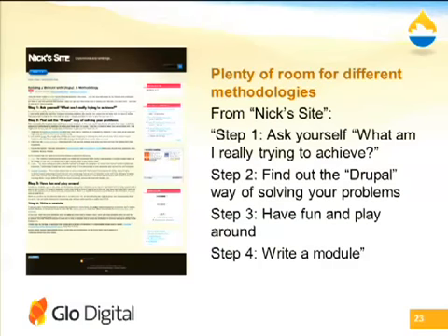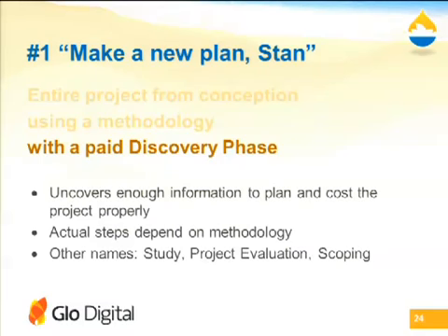And I'm still explaining the meaning behind making your plans stand with a paid discovery phase. So before we talked about the discovery phase having various components, and the idea is that it uncovers enough information to plan and cost the project properly. And of course, the actual steps in the discovery phase are probably going to include some of the things I mentioned before, but it will depend on how you go about doing your projects. Some people call it other things, a study, a project evaluation, and a scoping are the terms that I've heard before, a scoping exercise.